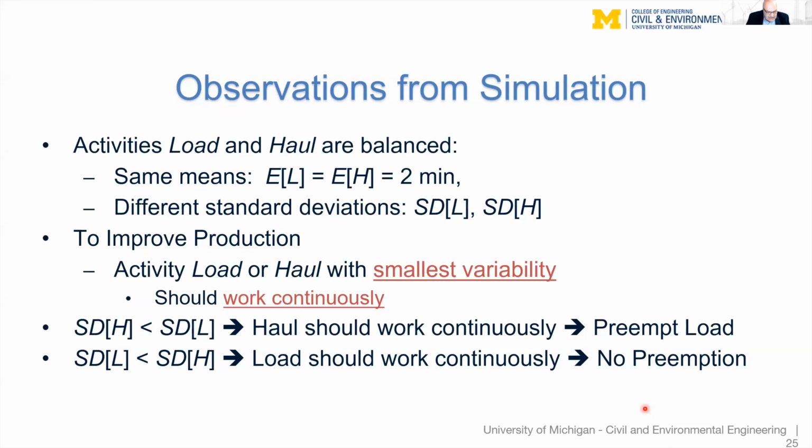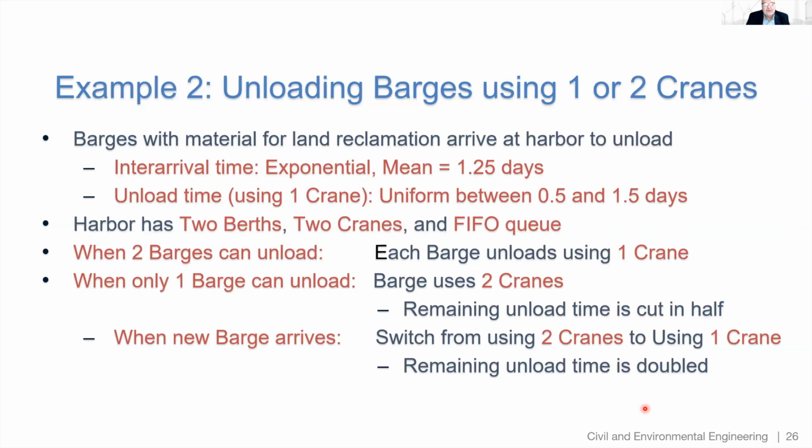And looking at the time, I seem to have only 3 minutes left, so I am going to speed things up. The second example involves unloading barges using 1 or 2 cranes. So what we have here is that barges with material for land reclamation arrive at a harbor to unload. The interarrival time is exponential with a mean of 1.25 days. The unload time is uniform between half a day and 1.5 days.